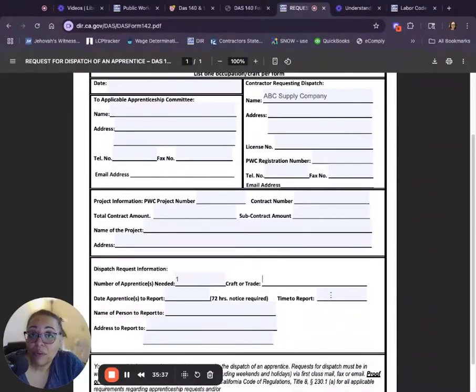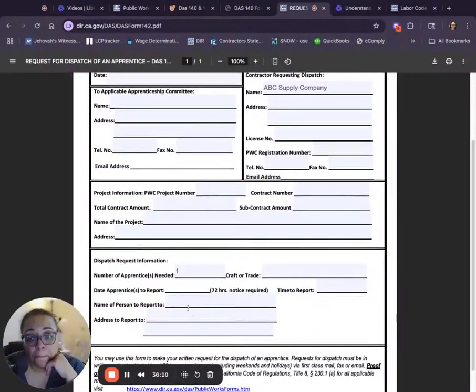And the time to report, remember, you're going to want it to be, if you're filling it out for Pacific time, you're putting 11 a.m. Eastern time because then they know it's 8 a.m. Or you're communicating and saying, hey, you guys are going to be on the site at 5. You're going to be there at 7. When's a good time for someone to come? A lot of times the first day an apprentice reports on the job, it's not the first day that our client's working. It may be a week later, but you want to get that request sent in so that if they do send someone, the percentages are correct.